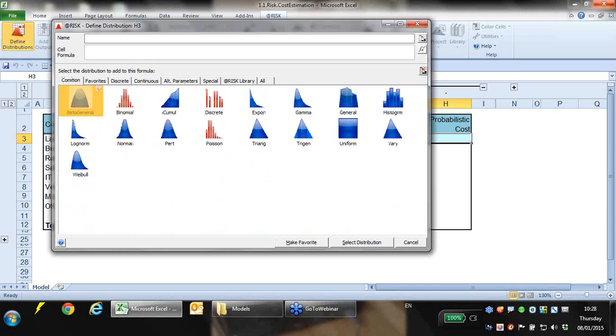And I'm sure that some of you will be sitting on here hoping for the holy grail, where I say this is the right distribution that you should always use. But the reality is that there's often no absolutely correct distribution. Sometimes it's about choosing the best one, or one which is appropriate, and not getting too hung up on which one. The reality is that between a PERT and a triangle, is there that much difference? Probably not. So I'd guess that maybe 99% of our customers, possibly even more than that, don't go beyond this tab here, where we've selected some of the more common ones.